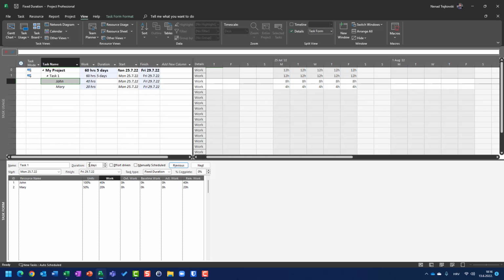Let me walk you through a final example. If I put like here 8 days, okay, 8. You will see 8 days multiplied by 8 hours per day is 64 hours, multiplied by 100% for John, resulting in 64 hours, sorry, I always make a mistake, 46 and 64. So this is 64. And for Mary, 8 days multiplied by 8 hours per day, which is 64 hours, multiplied by 50% is 32 hours in total.